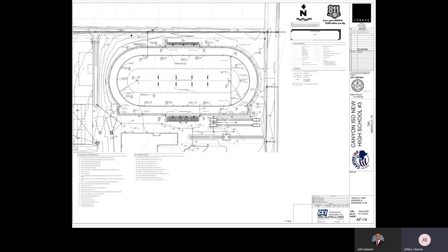You can just move through that process quickly. And when you're building it, everyone has the exact same guideline guiding what's going to be constructed, without questions and ambiguity. The detail is so important that you don't miss anything, because if you wait till the time of construction for changes to hit the door, the time and the money it takes go skyrocketing, and it can turn a project into a disaster. So if the drawings and detail are right during planning, then it's going to be smooth during design. If we're detailed and thorough in design, everything else is going to be smooth as well, and everything stays on time, on budget, good quality, everybody's happy.